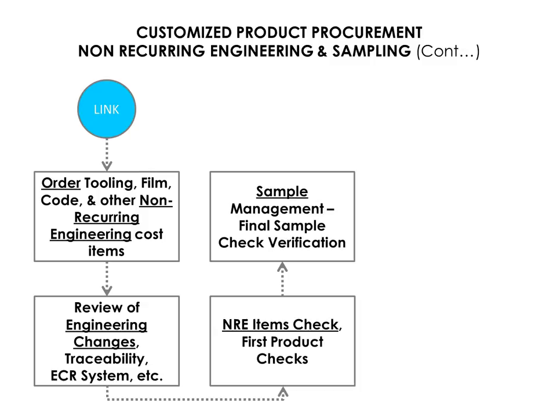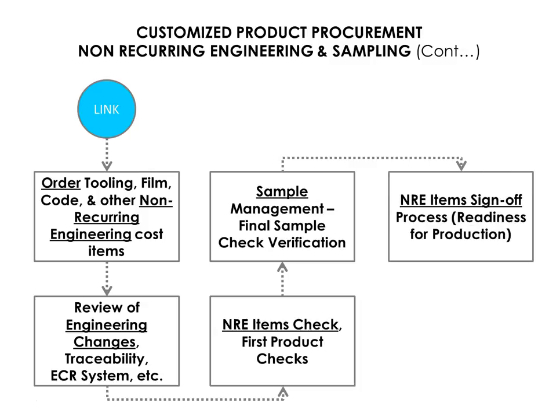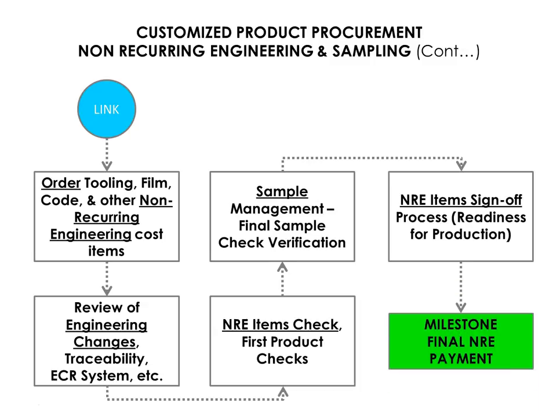The next step in this phase is the actual product and NRE items sign off. This would include you checking every aspect of the parts being produced as well as signing off the functionality and the working state of the NRE item itself. This would be a milestone in your new product introduction plan — the production ready milestone. It also concludes the NRE and sampling phase.